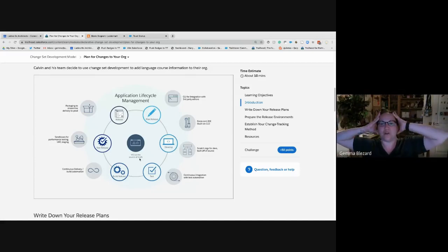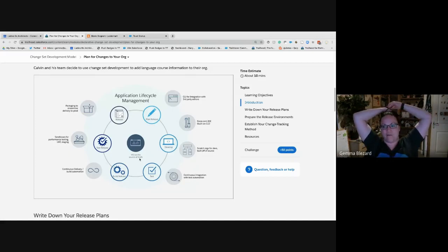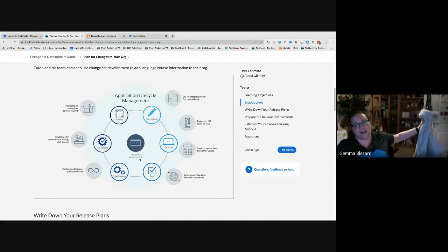And in those sorts of projects, they've got to very carefully manage the adoption of Salesforce, and they're used to spending time to get things very, very right and very locked down before they go ahead and build, which is known as your traditional waterfall approach. So in that sort of environment, your release planning actually happens because you're doing your analysis up front. So you're having workshops with stakeholders, ideally people from the sales organization, if it's a Sales Cloud implementation, people from finance, management who will want to see reports. You should ideally have some end users in there.